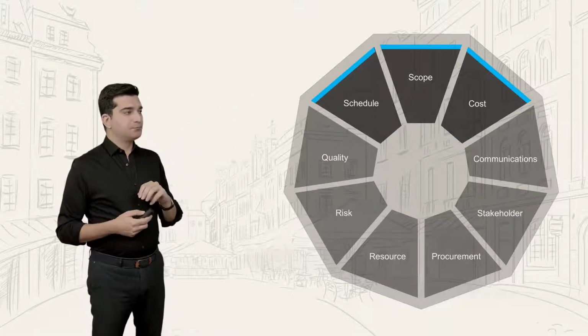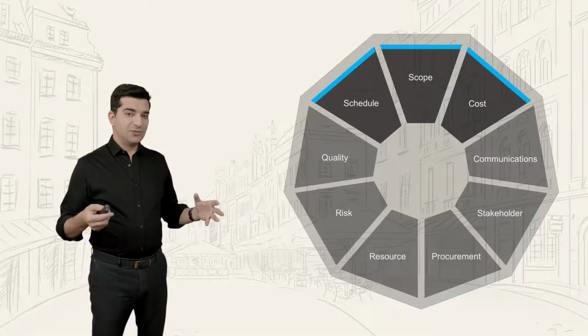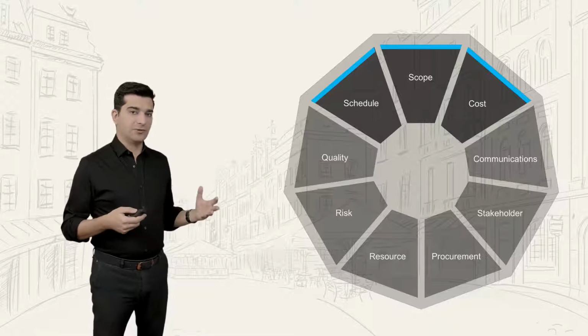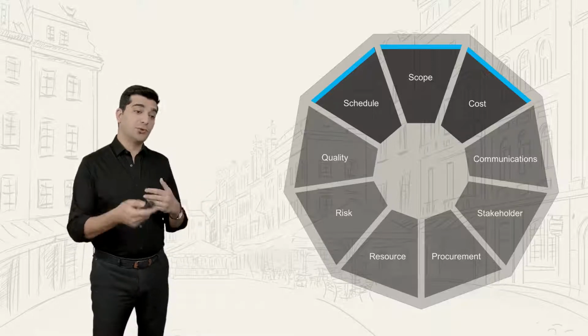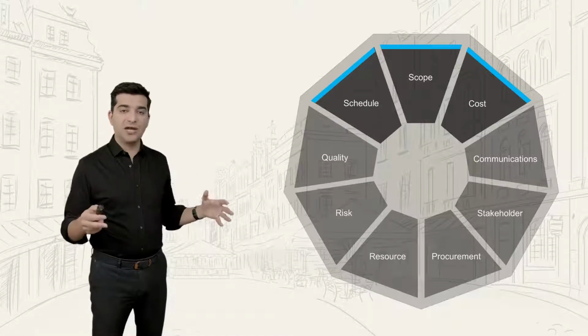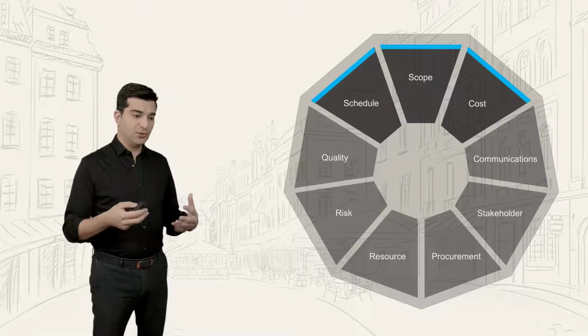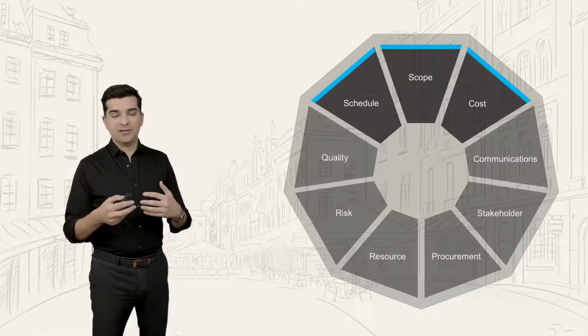For example, think about risks. You identify the risk, you realize that someone may fall down. That's a terrible thing. So you think about the responses that you can have. For example, you're going to build handrails, you're going to change the sequence of activities, you're going to ensure the site, and many other things.